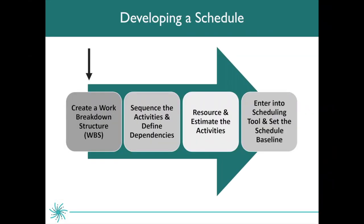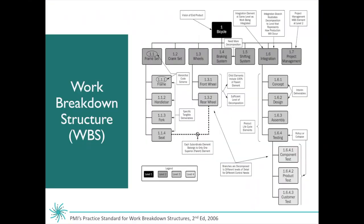First and foremost, when you are developing a project schedule, you want to create a work breakdown structure. I have a different video on going through the specific steps for this. However, I want to provide a quick overview of what a work breakdown structure looks like. Here is an example work breakdown structure from the Project Management Institute. This very top level is called level one and this is where your project name goes — in this case, building a bicycle. This next level of work is called the level two work breakdown structure, and you want to have level two as the main component.